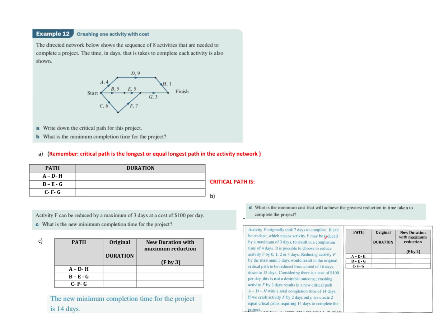So we've done the table method down here. What they did is they've written all the possible paths there. So let's have a look, and we'll just write them out in the table. So A, D, and H, that would take me 14. B, E, and G, going across that way, would be 13. And C, F, and G would be 16.